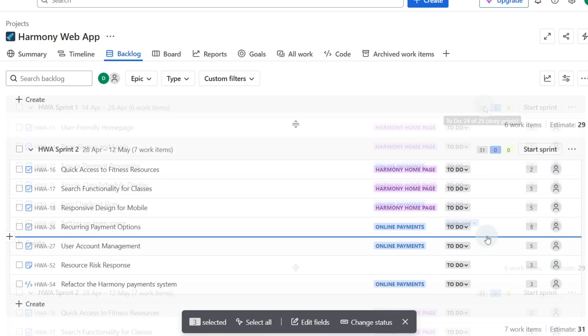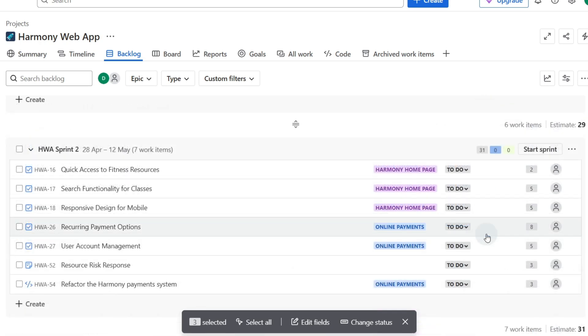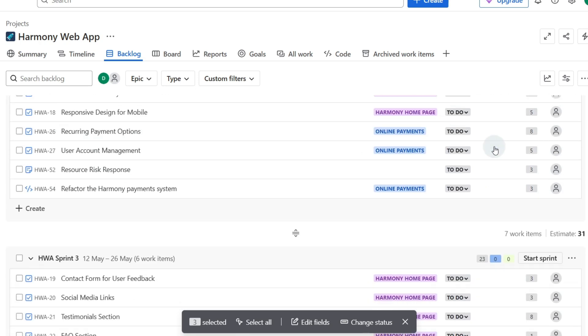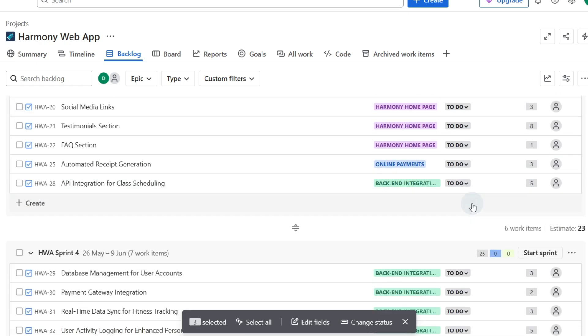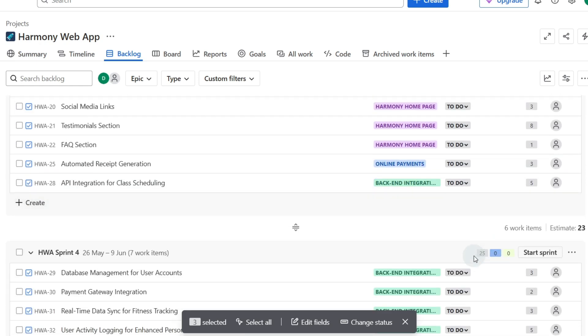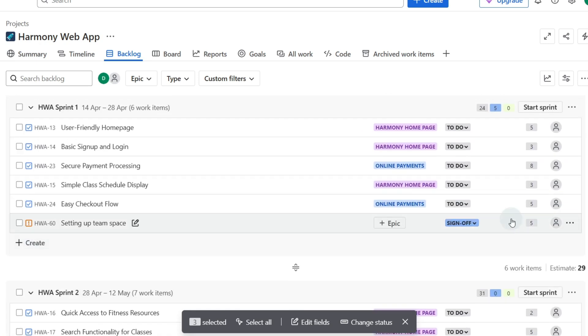So if our velocity is around 30 story points this is perfect because we've got 31 story points and similar around 23 coming up or 25. So maybe our velocity is around 25.